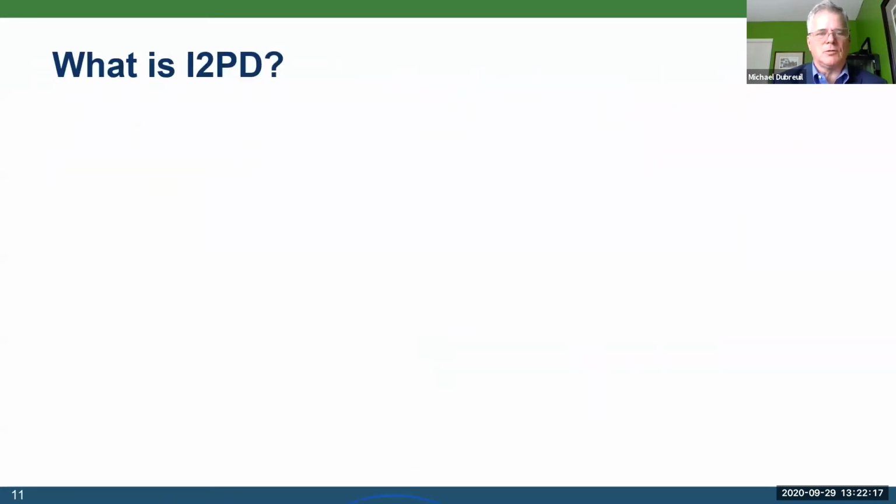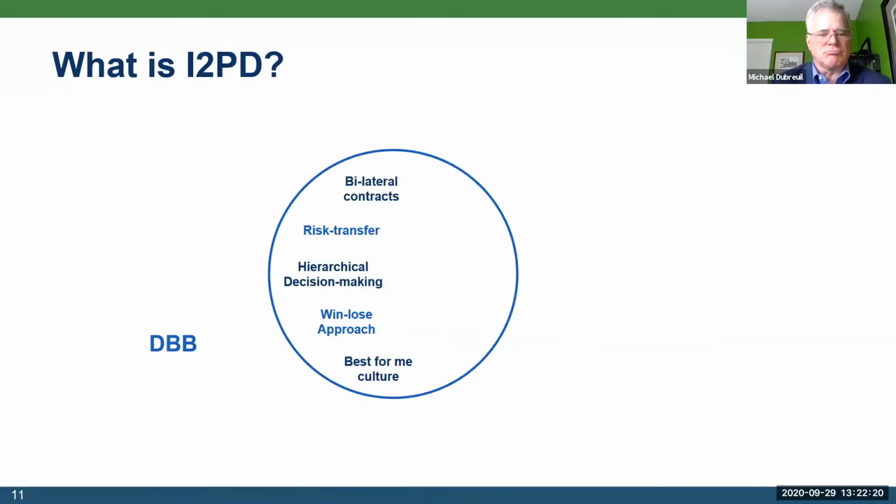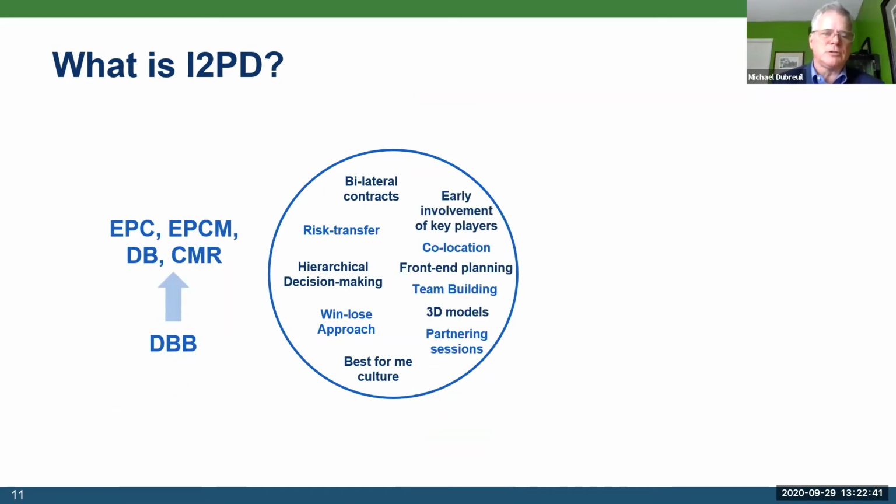You know, if you look at traditional delivery methods, contracting strategies, design, bid, build, based on risk transfer, hierarchical decision making, and a competitive, win-lose approach, and what's best for me, depending on what side of the coin I sit on, owner, engineer, contractor. We evolved over time into more comprehensive delivery methods, EPC, EPCM, construction management at risk. And we included more elements such as earlier involvement of key players, co-location, front-end planning, and partnering sessions.